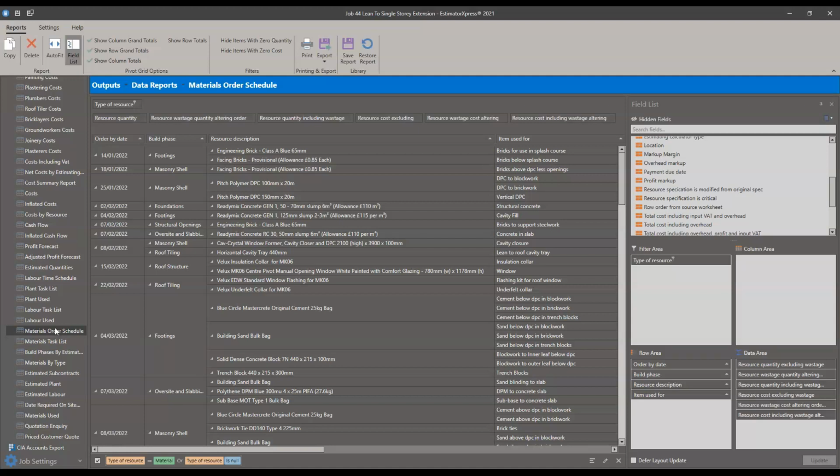If you've got a resource that takes 6 weeks to be delivered because of its standard ordering time, let alone whatever backlog there might be currently, this report will say, if you've got a job starting end of March, then by mid-February you need to have ordered the material for it to turn up on time, so you can get on with the job without any delays. The joy of planning. That might not be 100% applicable because of the delay on some materials at the moment, like bricks, blocks, roof tiles in particular. But the report can still play a valuable role in helping forecast those issues.